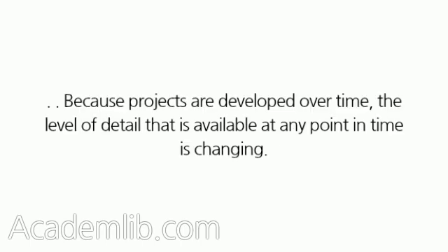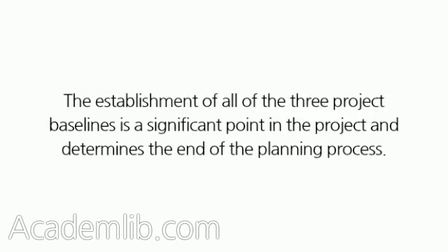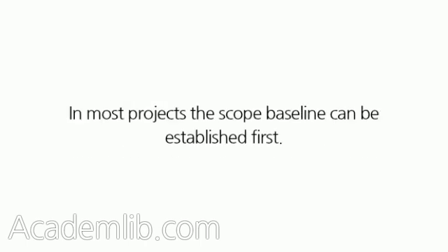Tell me more. Because projects are developed over time, the level of detail that is available at any point in time is changing. The establishment of all of the three project baselines is a significant point in the project and determines the end of the planning process. In most projects, the scope baseline can be established first.